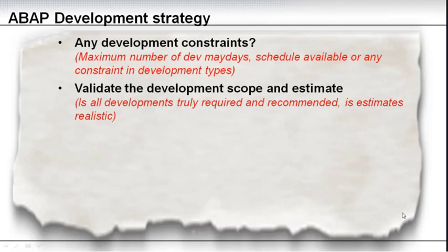Now, they can't do that estimate without involving ABAP. That's why, when you're staffing your team, you need to have ABAP support during the last part of your business blueprint design phase, even though no ABAP development work will actually be started. But you need to have the ABAP developer skills or an architect there, to support the functional team in estimating what developments can be done.